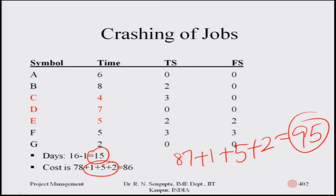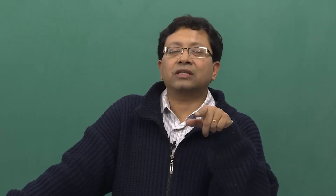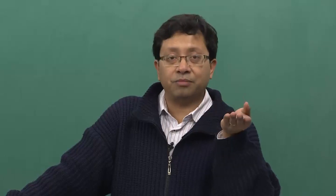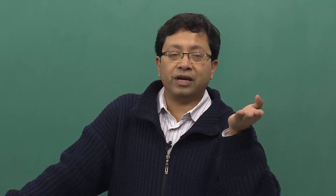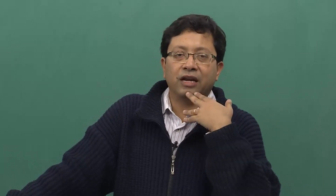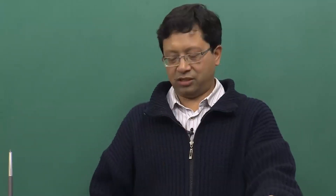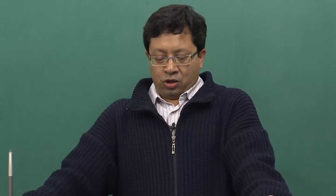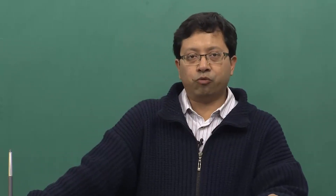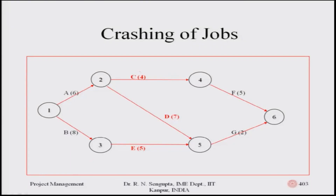You must balance this cost increase against the revenues or profits you expect to generate. If the benefit justifies the cost, you analyze the total project using diagrams and consequence discussions as covered here. The activities shown bold red — C, D, and E — represent the reductions happening, and the total cost consequence was mentioned in the previous slide.